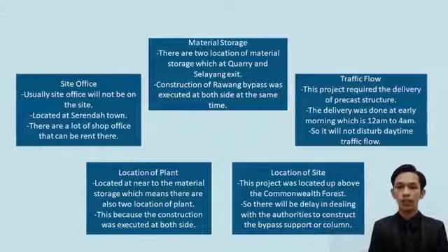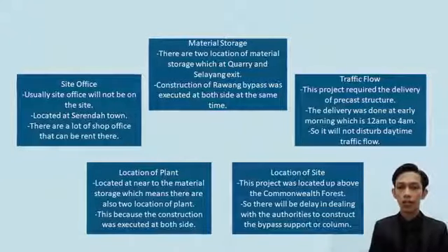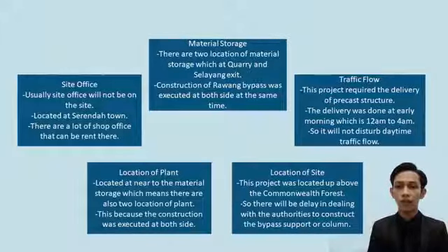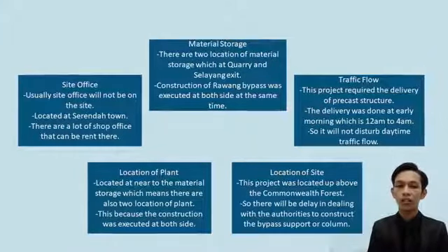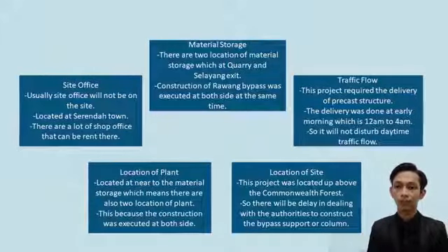Last but not least is traffic flow. This project requires the delivery of precast structure. This will disturb the daytime traffic flow. So, the delivery was done at early morning, which is 12 AM to 4 AM. So, it will not disturb the daytime traffic flow.